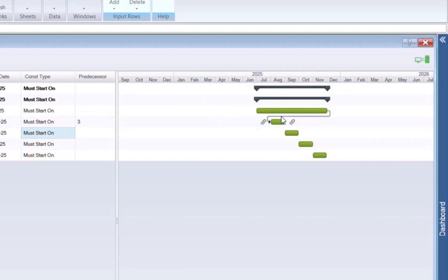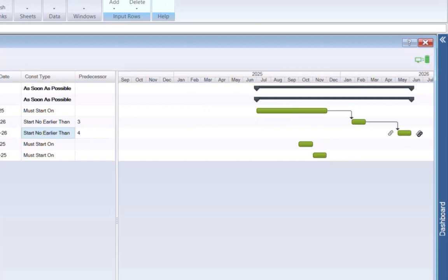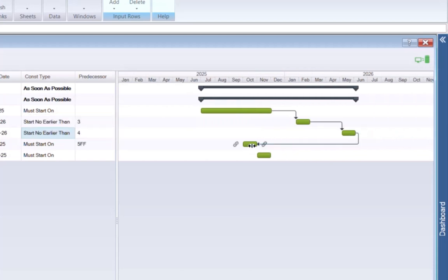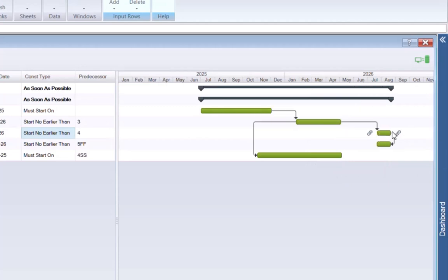This is a great feature as it allows you to drag and change the timings for all of your different tasks within a project, allowing you flexibility around how you would like to link all of your different tasks, when they should start, when they should finish, and their length of time. This also means that you can come back at any time throughout the project. For example, if the development approval was to take longer than expected, you can increase the time frame for that development approval, and then everything that is related to that development approval will also change and move with that time frame change. This also means that it will allow you to reforecast this back on the cash flow.